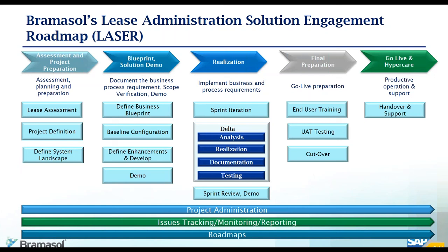Then you go to realization. This is a phase where we freeze the requirements, and now we are building in cycles of 2 to 4 weeks. Those multiple sprints happen in that sprint iteration. It's kind of an iterative process. That's where we design, we document, we design, and play it back. Those are the 3 typical things that happen during this phase of the project.